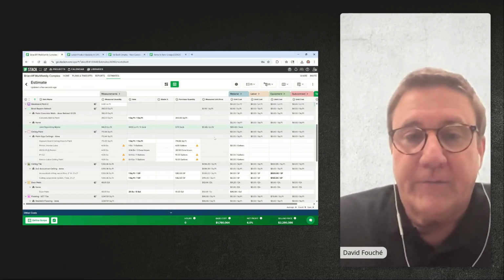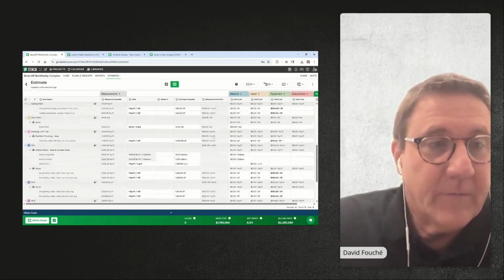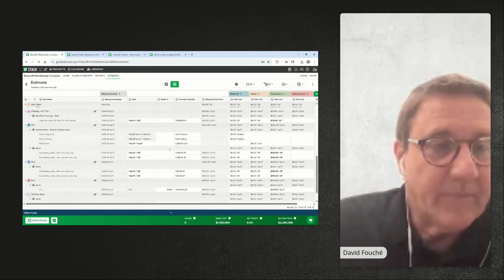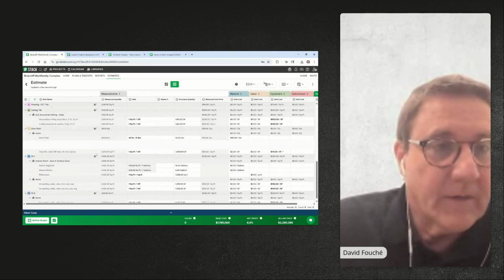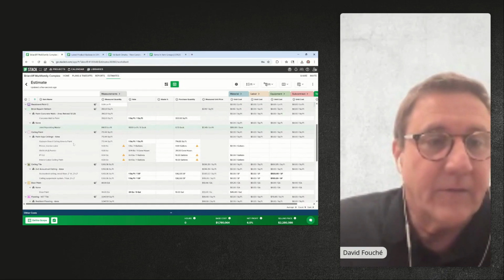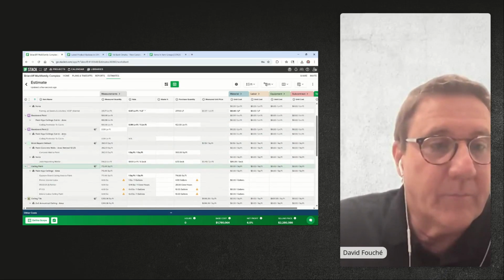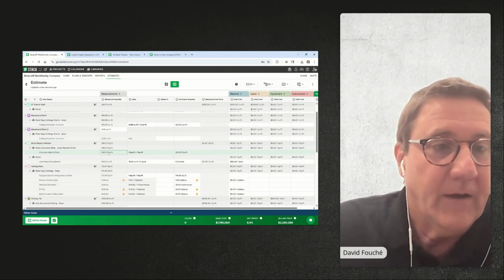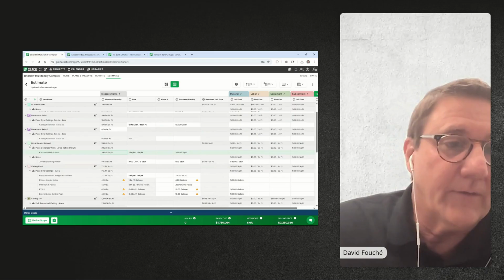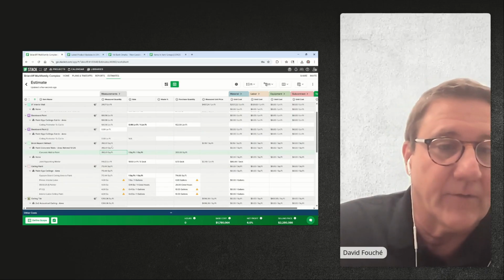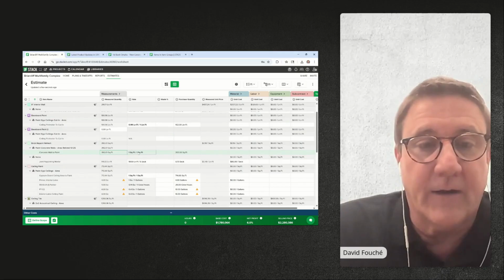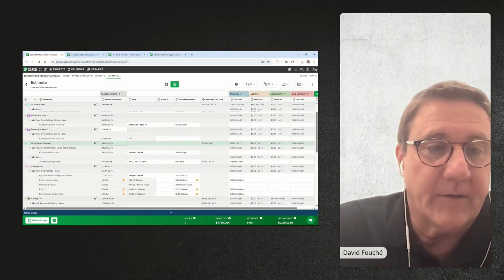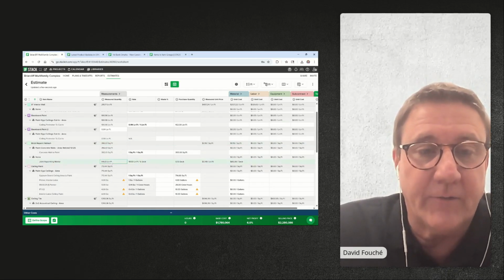The measured unit price difference. Now what that is, I'm going to go down to my painting. So hang on just a second. Okay, so I've got some ceiling paint here. Brick repaint refresh. Now notice here I've got square feet attached to this. This takeoff is a linear takeoff. So what I've done is I've just drawn a line and given it a height, and I've got some formulas that drive this. But then I've also got a linear item here. So I'm measuring square feet here from this area takeoff, but I've also got a linear foot item.